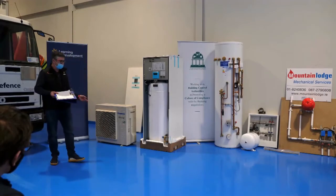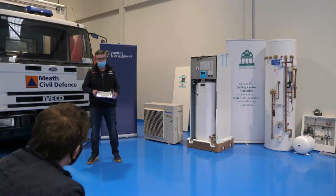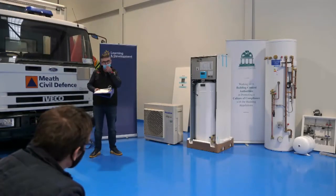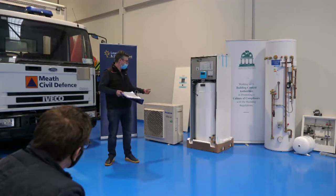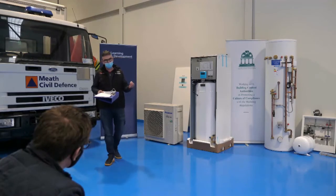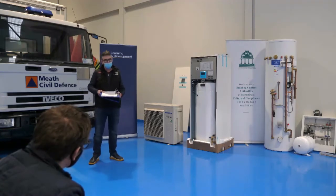It's crucial with everything, but it is crucial that when the builder's starting his house or whatever else, that he's allowed how he's getting the fridge pipes from this unit here to the outdoor. So a bit of thought should have gone into the ducts. And will that duct typically contain the gas pipe and any, let's say, electrical? No, electrical would be separate, because the electrics running from one to the other, they're multi-core. They have some communication cables in there, and they can be quite sensitive. So you wouldn't run the electrics with the pipe work. You need a proper underground cable or in a duct.